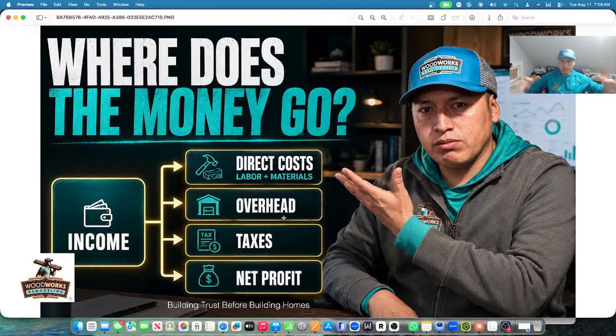You see, if the big overhead is spread across 100 teams, then it's just a little piece per team that has to cover the overhead, plus the net profit and all the direct costs. This company has a small overhead, but only one group is going to cover that overhead. Then that overhead could be bigger than the small piece of the big company. So at the end, it's not necessarily the big companies that will be the most expensive. It could be, but not necessarily all the time.